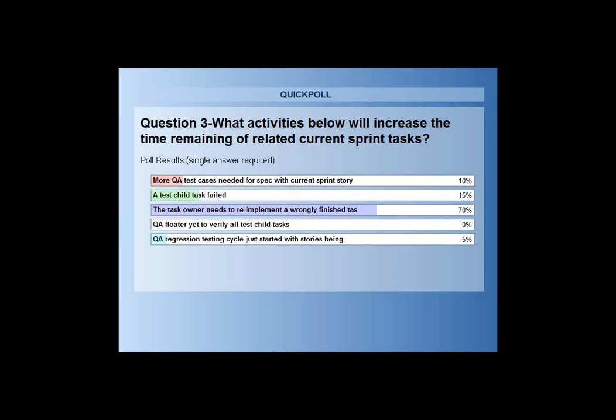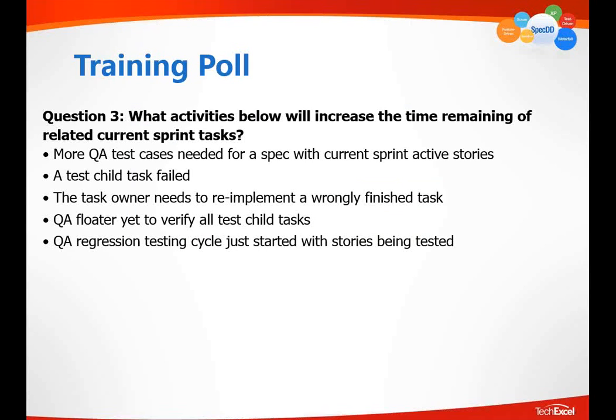One of the reasons Agile is successful is that it creates a self-driving team. A self-driving team needs to have a sense of ownership. They can commit all the tasks on day one, estimate all the time remaining needed, and feel comfortable that we are going to finish all the commitment. So don't add additional defects. The regression testing should create additional defects, but assign them to the product backlog for the team to pick up in a future sprint, not the current sprint. So time remaining will not be increased at all.